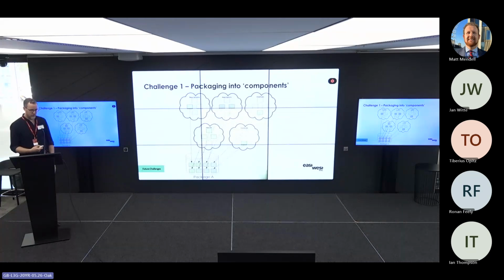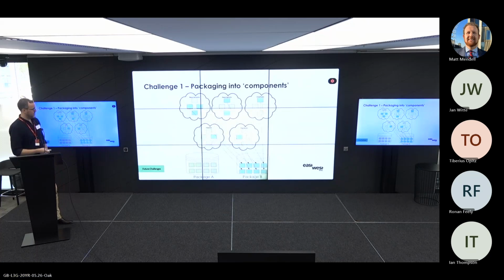At some point, and not too far into the future, we're going to have to go through this data and start allocating it to a package. So like I said, it could be a station. It could be that this is a station, and then we'll take all the applicable station requirements and the assumptions and the hazards and things, and we'll put them in a package. And then there'll be another package, and so on, and so on, and so on.